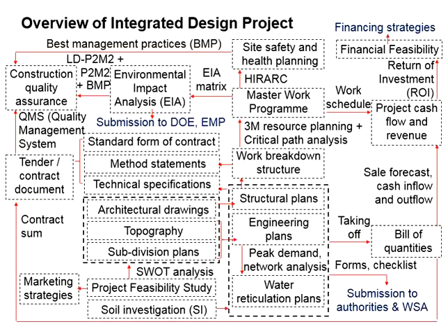The second half will involve the specifications of the project, such as the requirements of the materials, standards, as well as the method statements for the project. Therefore, you will need the method statements of the construction process as well as the technical specifications to be incorporated in the tender and the contract document.